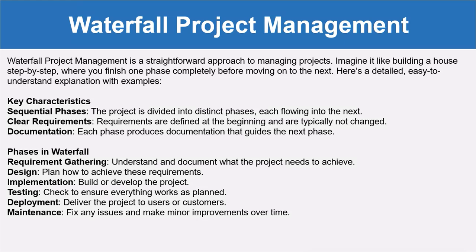The phases in waterfall are: first, requirement gathering — we understand and document what the project needs to achieve. Then the design phase — we plan how to achieve those requirements. Then implementation — we build or develop the project. Then testing — we ensure everything works as planned and is working properly. Then deployment — we deliver the project to users or customers. Finally, maintenance — we fix any issues and make minor improvements over time.